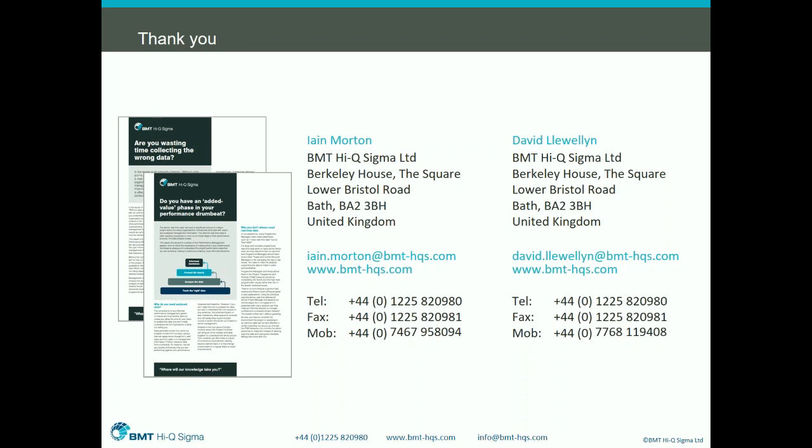Yeah, I think that's the real value: them analysing the data that's coming up to the programme or portfolio office, rather than just taking it and copying it. If you think about the project controller, they don't have the view of the program, so they will solely look at how the project is performing. The program office are the only team that will have the true picture across the entire program, so they need to look at the potential impact across all of these projects.